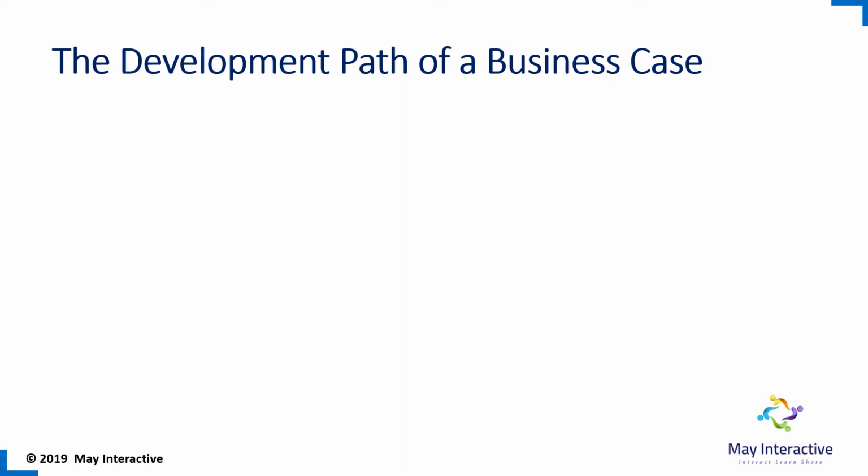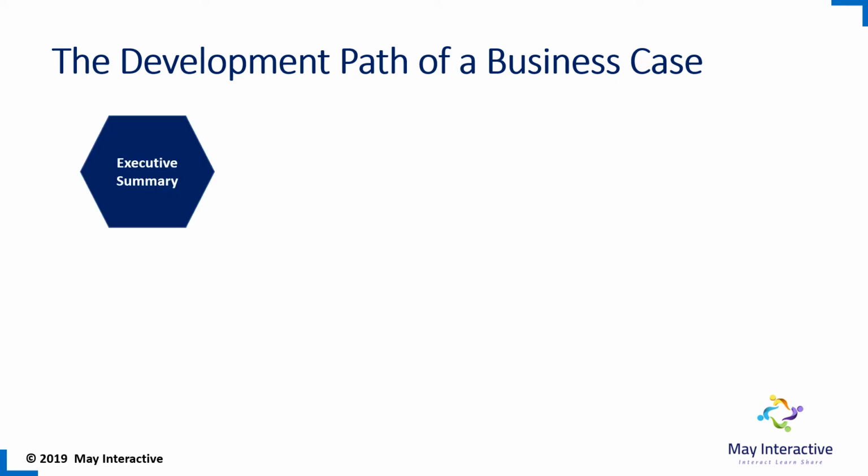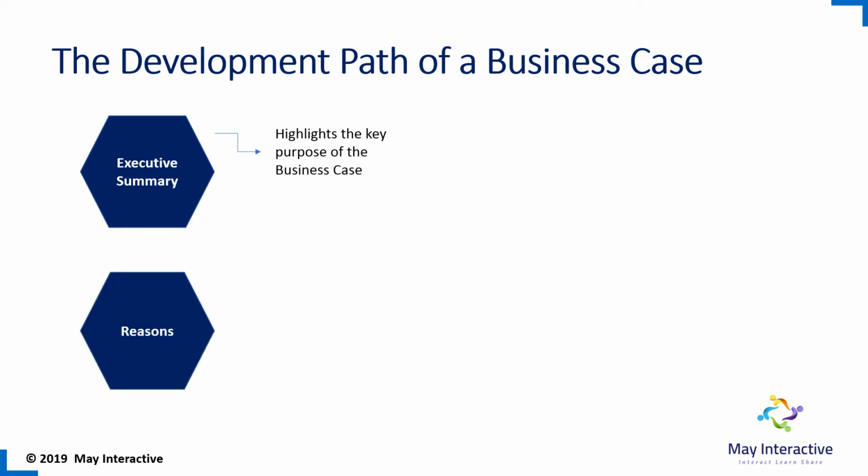When writing a business case, the business case needs to have the executive summary. This highlights the key purpose of the business case, the reasons, explains why the project should be undertaken, and describes how this benefits the organization.